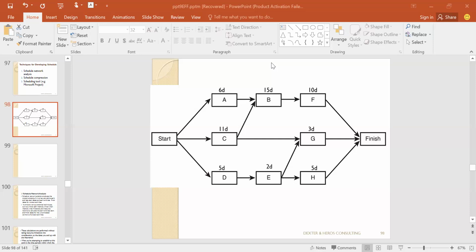Subtract the total duration of each part from the part with the highest total duration. I repeat again: subtract the total duration of each part from the part with the highest total duration. Full stop. Continue writing.